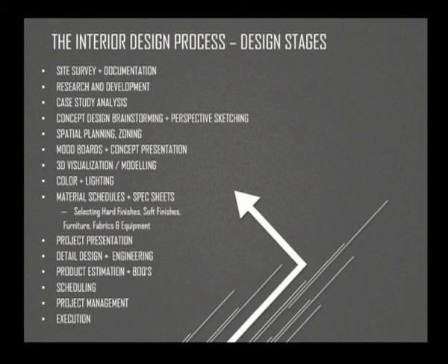After you do that, you have to do scheduling. Scheduling is something that is more pertaining to people who are working practically. So you probably wouldn't be doing this in college, but people who do interior design for real life projects, we need to do project scheduling, which means you forecast a timeline for the given amount of work on site, whether it's laying tiles, whether it is civil work, whether it's demolition.